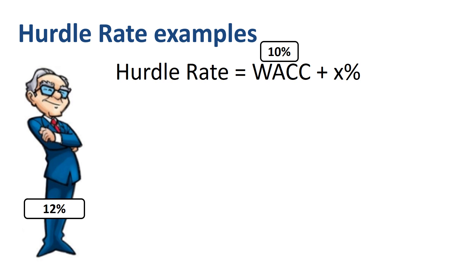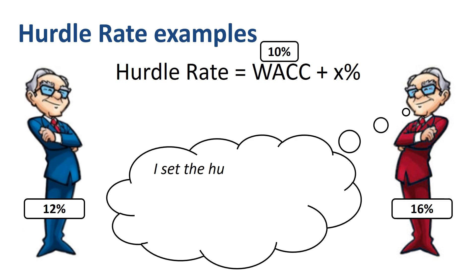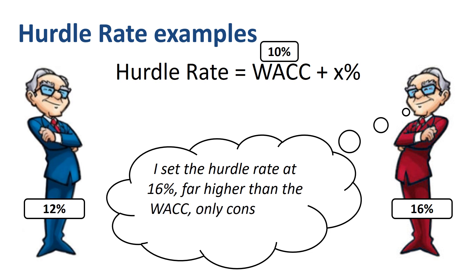The CFO in red, on the right, takes a different approach. He sets the hurdle rate at 16% — a WACC of 10% plus 6 percentage points. This hurdle rate is far higher than the WACC. The reason is that the CFO in red only wants to consider the very best projects with IRRs that significantly exceed the WACC. He raised the bar significantly.